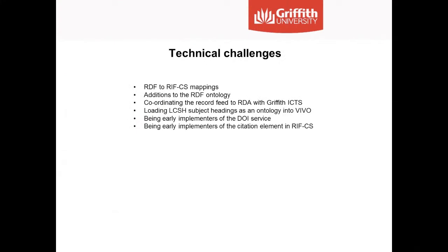So, some technical challenges: the RDF to RIF-CS mapping, and there were also some additions to the RDF ontology to accommodate gold standard metadata levels. And for us, it was also about coordinating the record feed to RDA with Griffith ICTS. We were relying on assistance from ICTS whenever releasing a new MOI version, and we had no direct access to test and production systems, which were used to upload our records via the automated feed into ANDS's test environment for review.